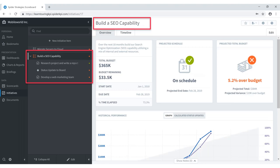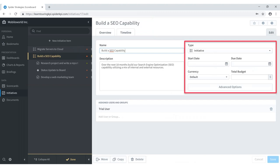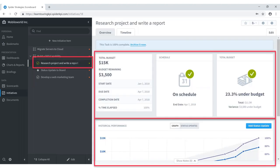Here's an example of a more complex initiative — build a search engine optimization capability. This initiative was defined with a name and description, set up as an initiative type, but intentionally without a defined start date, due date, or total budget, because additional tasks and milestones would be set up underneath it, feeding their start date, due date, and budget information up to the parent initiative.